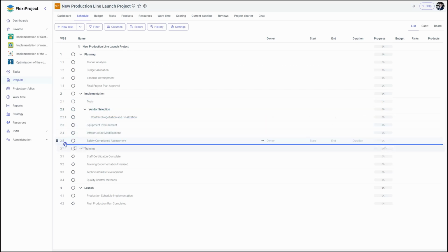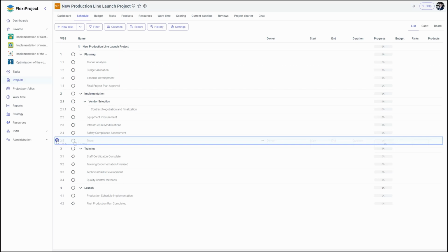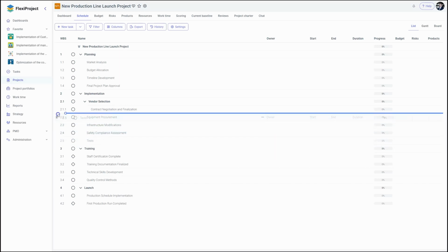This way, when I move the task, a line shows the hierarchy level it will be placed. If I let go, the task appears there in the structure. Note that when moving the task, visual spacing changes. Moving it up slightly shifts the indentation right, showing another hierarchy level. If I move it down, the spacing changes to the left. This shows how we can assign a task to various levels within the work breakdown structure.